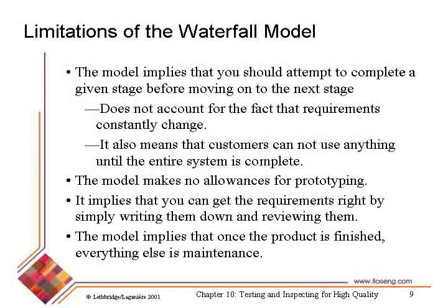However, it has some important problems. One of them is that it says, or it implies if you look at the diagram, that you've got to completely finish one step before you can move on to the next. So I've got to completely finish my requirements before I can even think about the design. Then I've got to completely finish the design before I can think about the code. Now, that is inefficient in a number of ways.